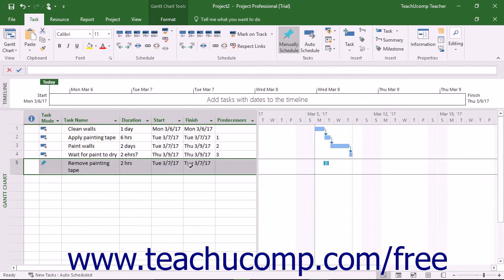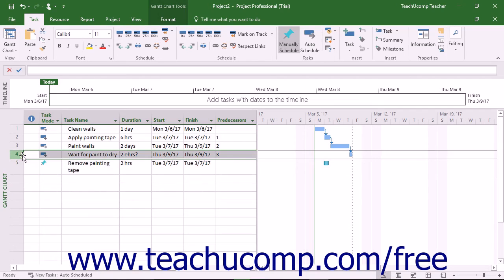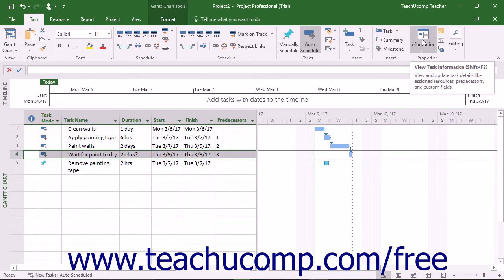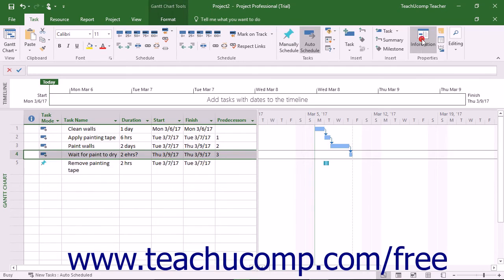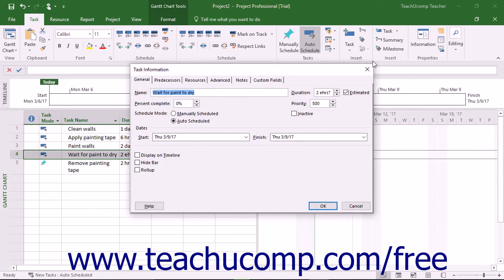To change the type of link between two tasks, select the dependent task, and then click the Information button that appears in the Properties button group on the Task tab in the ribbon to open the Task Information dialog box.